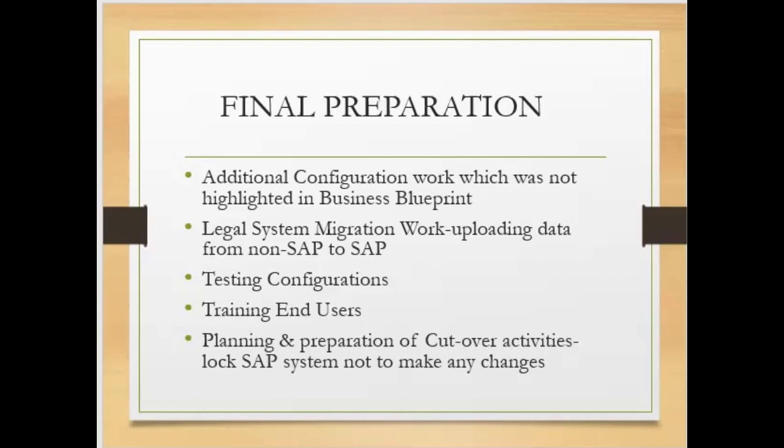The testing phases can be expanded or reduced based on the project timeline and cost. ST, SIT, and UAT are must-have. Quality Testing (QT), Penetration Testing for external threats, Smoke Testing for integration, and Volumetric Testing for long-term system performance may be included depending on the project. All this testing happens during the Final Preparation phase, after which we move to the training phase.